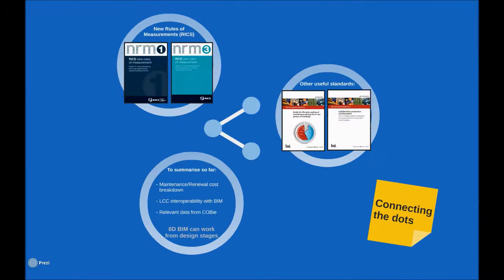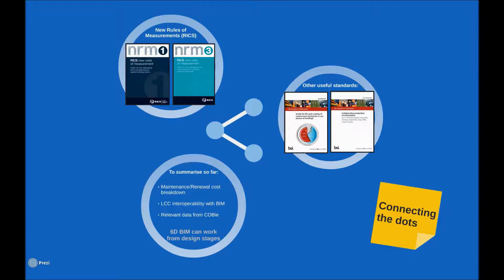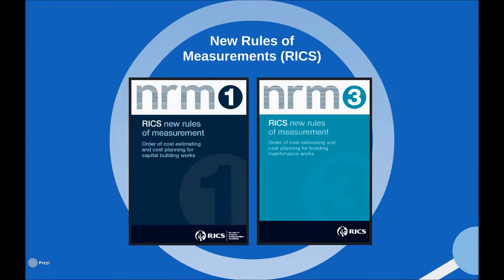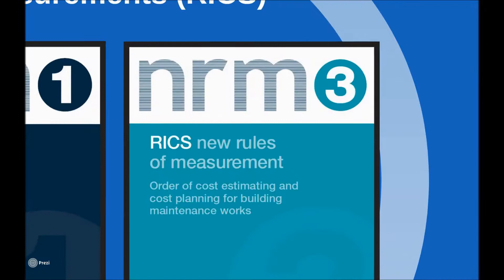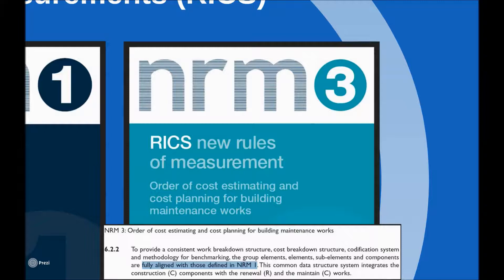Now we believe that there are some tools out there that should help us out and this is just a matter of connecting the dots between all of them. You will recognize the document on the left-hand side — that is the NRM1 document that Paul was talking about previously. On the right-hand side is the NRM3 document, which provides the rules of measurement for maintenance and renewal costs, which form the lifecycle costing. Inside that document is the following phrase: NRM1 can be mapped to NRM3, which means that going from the NRM1 cost breakdown for CAPEX, we should be able to get the NRM3 cost breakdown for OPEX relatively easily.